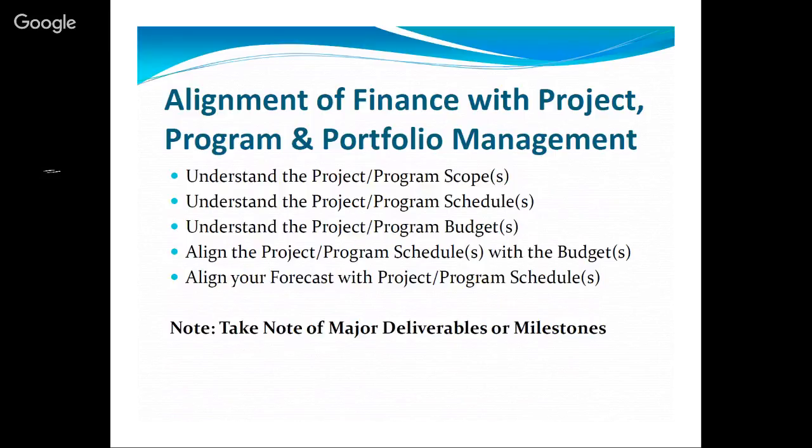Secondly, understanding the schedules is very, very important, because the schedules have financial implications. Delay, or even moving faster than you wanted, will always draw financial implications. Understanding the program budget, which is the initial budget, basically the baseline, is very, very important. And when you align the project with the program budget, the initial budget you are given, that will give you some comfort as you go into the execution phase and the controlling phase.